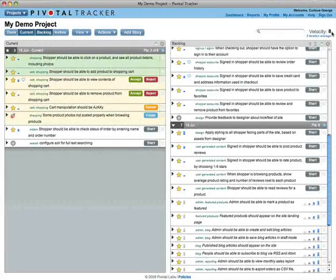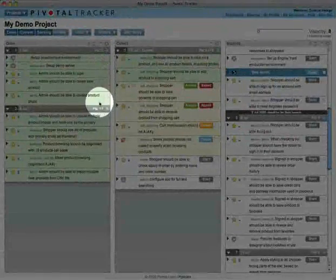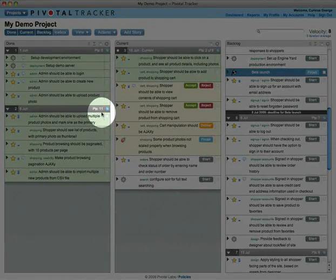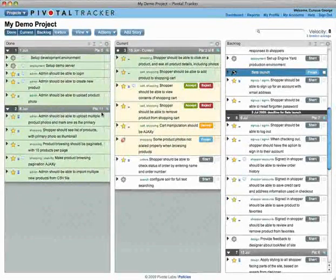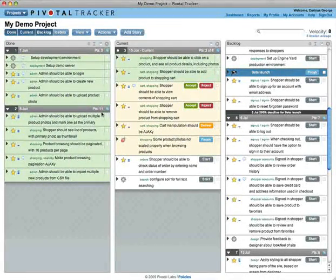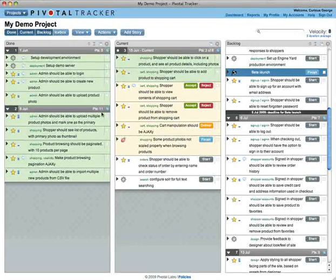Your velocity is the average number of points accepted in each of the past few iterations. At the end of an iteration, accepted stories are promoted out of the backlog and your remaining iterations are refilled according to your updated velocity.